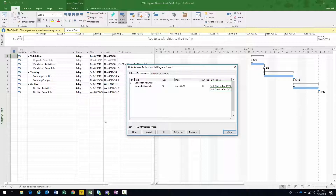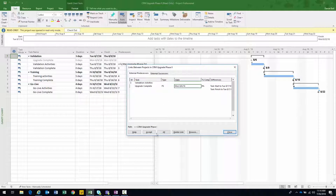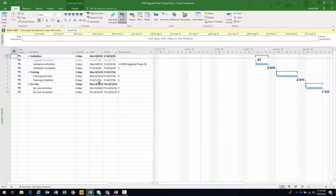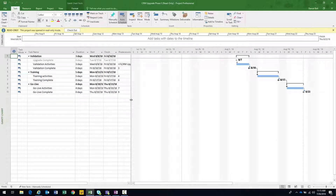That's going to affect the start date of my project. I have to accept this change at this point in time and let it make the change within my project. Go ahead and close out of this dialogue. The minute I do, notice that the Gantt chart went ahead and reflected that change. The start date looks like it's going to be 8/8 now — everything got delayed by a single day. Ultimately it changed the end date of the project. And that's basically the relationship between having inter-project dependencies — being able to save the projects without the master project and see how dates changing between the two affect each project.